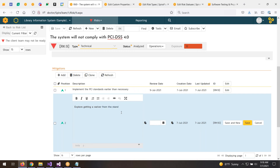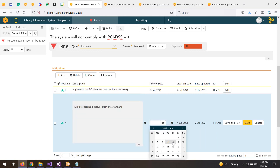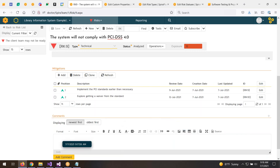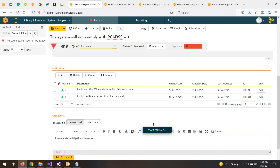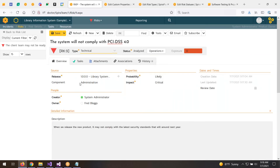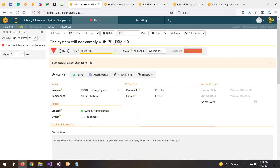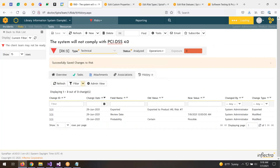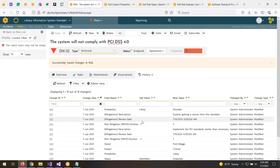Another mitigation might be to explore getting a waiver from the standards. You can have multiple mitigations for the same risk. When you've added the mitigations, you could add a comment such as 'I have added mitigations — based on that, I am downgrading the likelihood or probability.' You might then say it's not as likely anymore — it's now just possible. When you save, the exposure score drops automatically using the calculation, and the history contains the changes, including both mitigations and the risk itself — it's all in the audit trail.